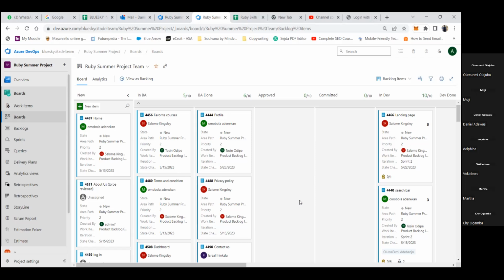You can decide that we're going to split that story, to have a shared credit that goes with the sprint we've worked on, because development work has been done, isn't it? And part of the testing work has been done. So on a particular story, about 70% of the work may have been done, with only 30% remaining. You don't want to take the whole story back, because if you do, what has been done in sprint 1 will not be reflected. You're taking everything into sprint 2. So you can decide to split it.